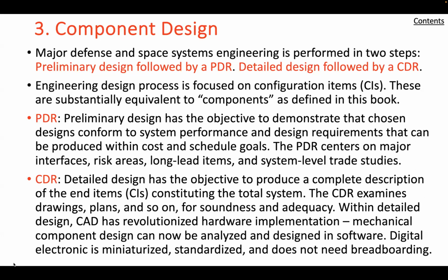Subsystem detailed engineering drawings, prototype hardware, interface control drawings, configuration control plan, detailed test plan and procedures, quality assurance plan, and detailed integrated logistic support plans. System engineering inputs are especially important to the interface design and test plans where necessary. Detailed analysis, simulation, component test, and prototyping must be performed to resolve risk areas.